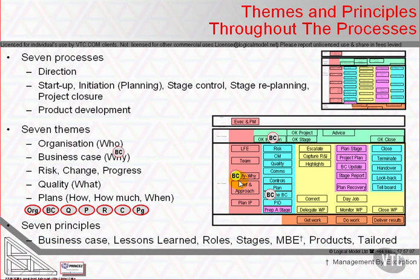The business case starts in outline as the justification in starting up a project, which allows us to ask the project board to authorize initiation. If they say yes, then defining the strategies and building the control pattern, we create a business case that properly reflects the costs that will be incurred both for the production of the products and for the control of the project, and the degree of risk that we're suffering. We refresh that at the end of each stage, and the project board reviews it to decide whether or not they're going to authorize the project to continue.